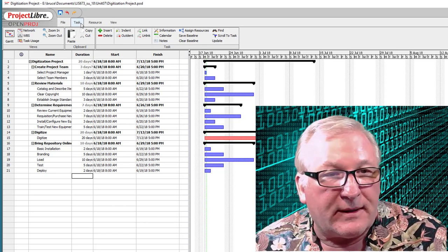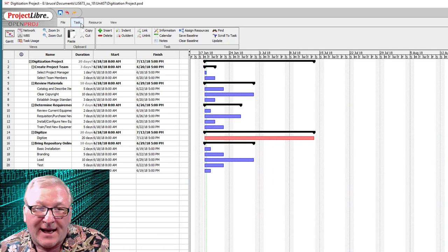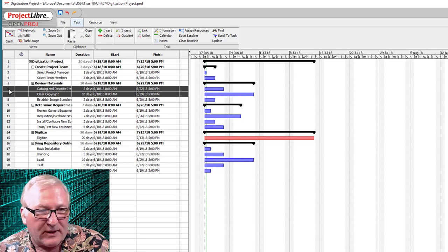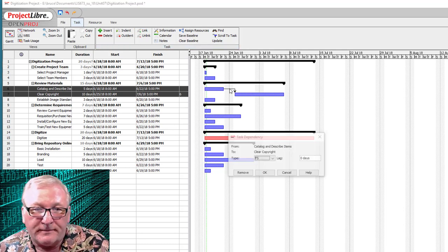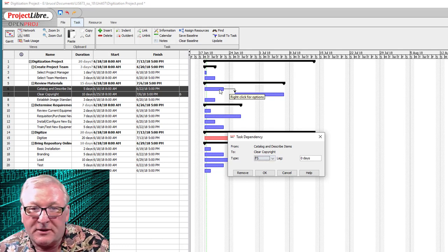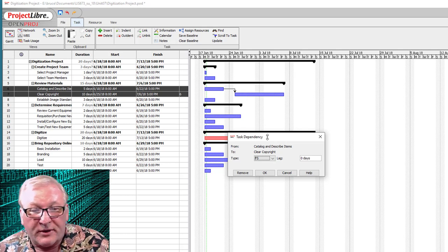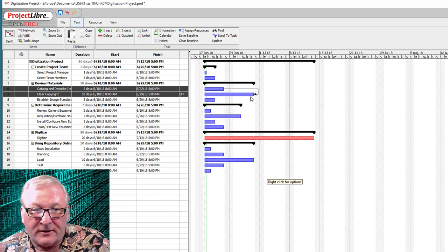Now what we need to do is actually connect these tasks to figure out our critical path — what tasks are dependent on other tasks. You can select a couple of them, as many as you'd like, and select Link. The default link type, if we take a look, is Finish to Start — you have to finish this one before you can start this one. But there are other choices.